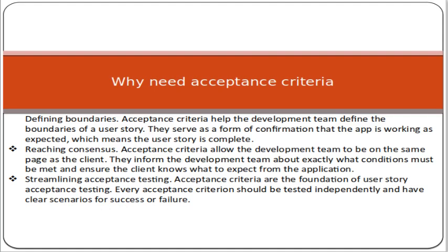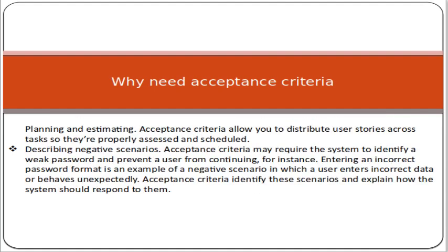These things are very important. Planning and estimation: acceptance criteria allow you to distribute user stories across tasks so they are properly assessed and scheduled. Describing negative scenarios: acceptance criteria may require the system to identify a weak password and prevent a user from continuing. For instance, entering an incorrect password format is an example of a negative scenario in which a user enters incorrect data or behaves unexpectedly. Acceptance criteria identify these scenarios and explain how the system should respond to them.